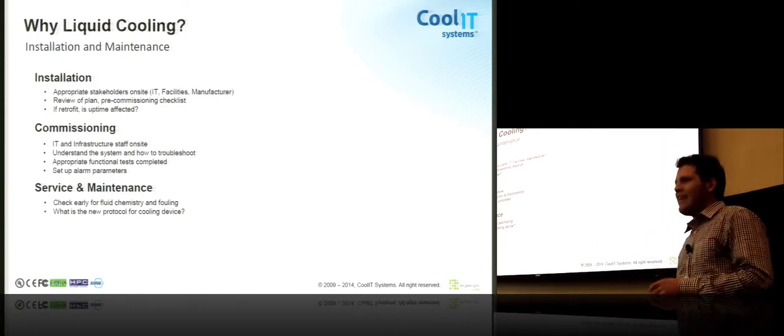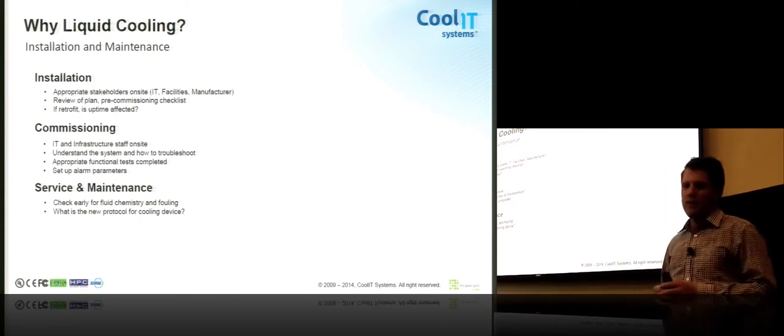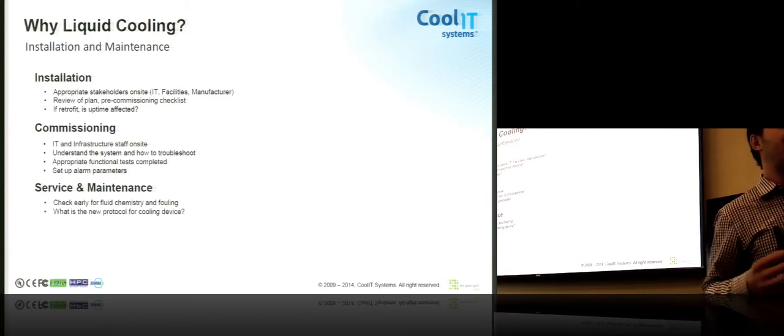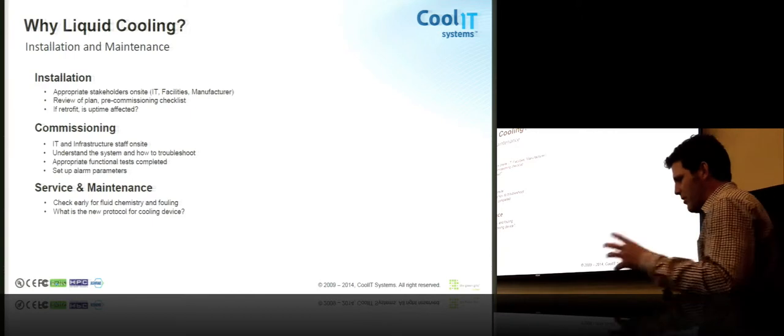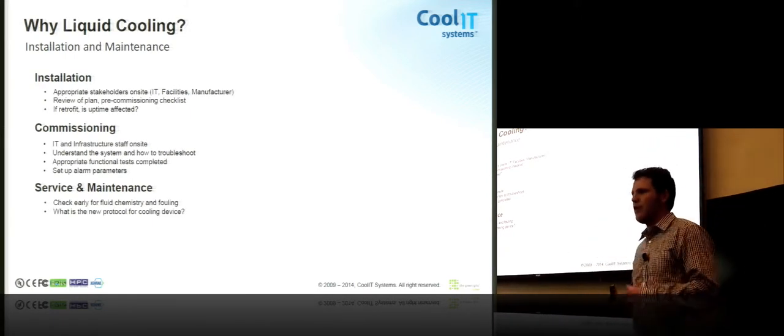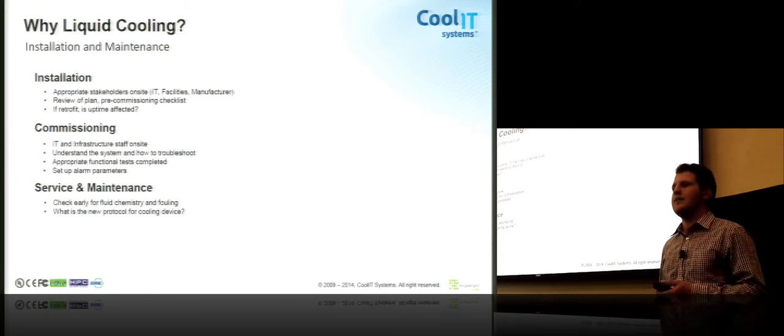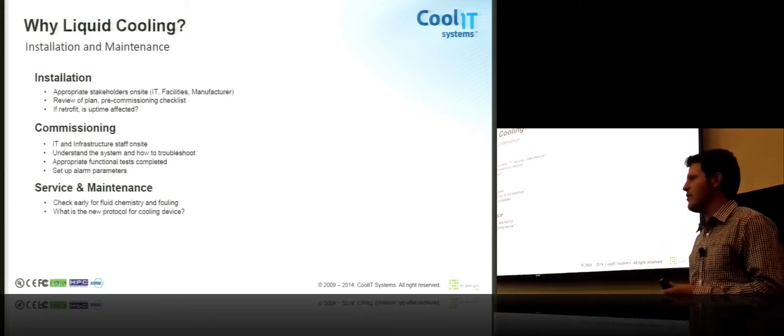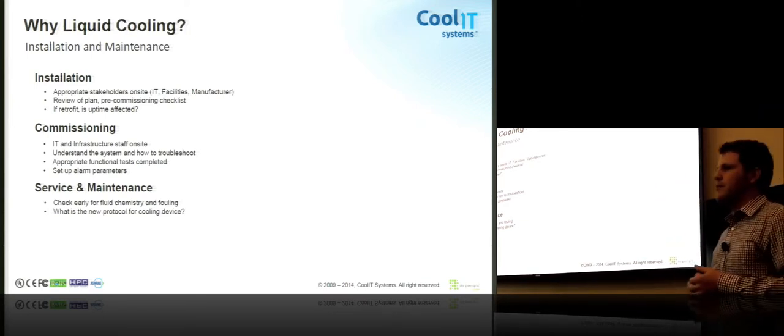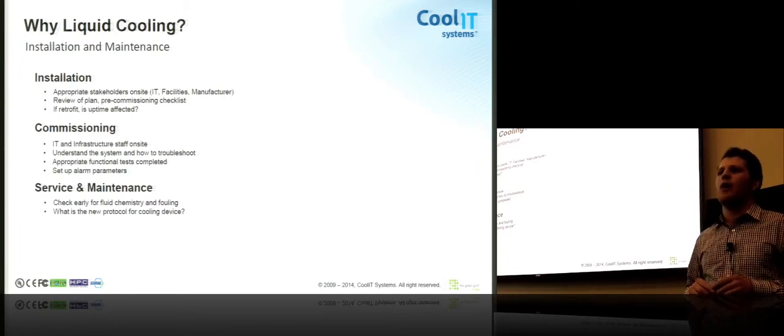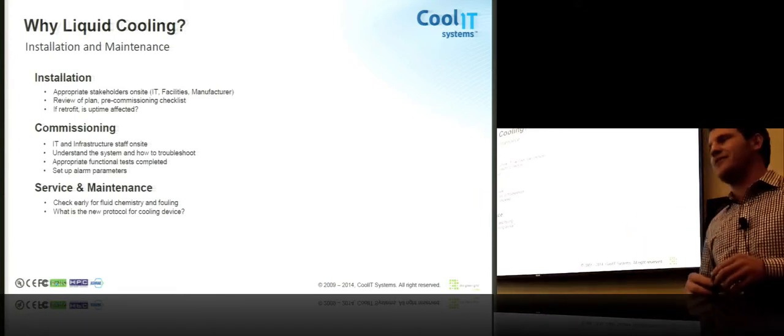Once you get everything installed, you're going to move on to commissioning. Again, you want most of these stakeholders on site. You really want to understand what you're about to do and plan for any irregular activities that might happen. If the plumbing didn't go perfect underneath the floor and you do spring leak, what are we going to do? How do we turn it off? Who's responsible for it? How long does it take? Is the IT on? Do we need to bring any other servers and compute nodes down? An appropriate functional test should be completed.